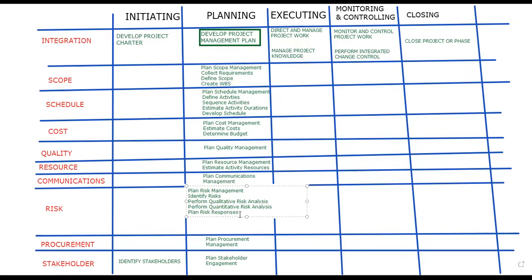This is where you decide to either avoid, transfer, mitigate, accept, escalate negative risks, or you escalate, share, enhance, exploit, and accept positive risks. I call that the A-team mnemonic, ATEAM or EASEE. Okay, and yeah, those are your 5 for risk right there.